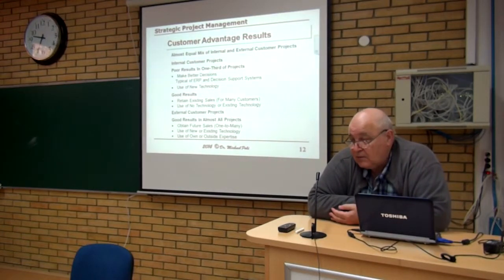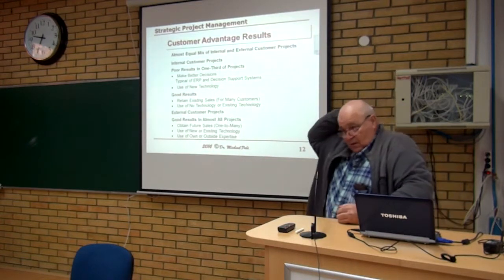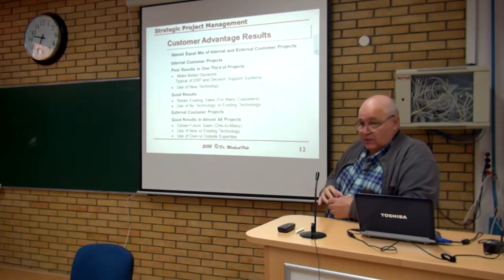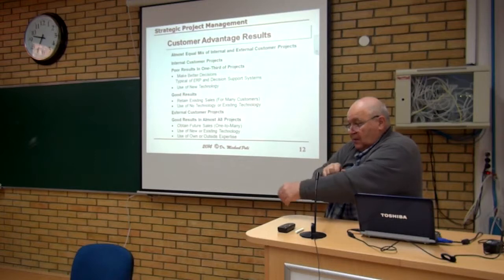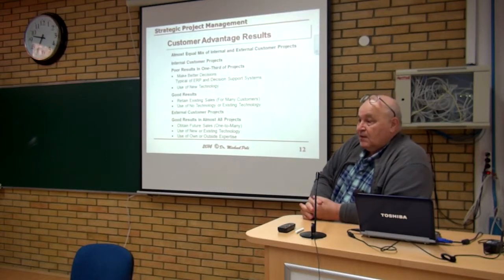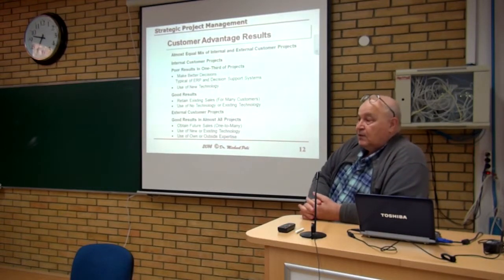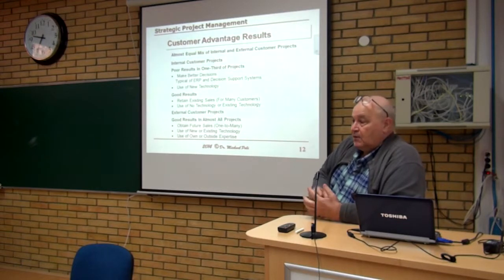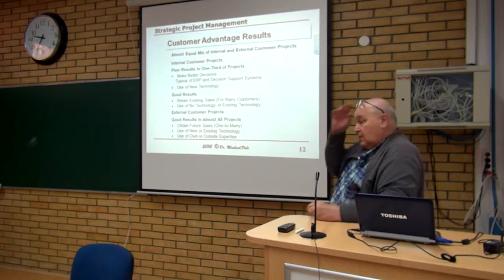There was an interesting thought on the cost advantage side that I don't think we saw. When we went through the cost advantage projects, when they used external experts to come in to fix the internal engine of the company, they found they had problems because the external experts did not really know too much about the internal engine of the company. They were constantly learning from the internal people. So typically those projects that used cost advantage as a focus for internal projects ended up being failures because the people that they hired from outside couldn't do the job. That was an interesting result.